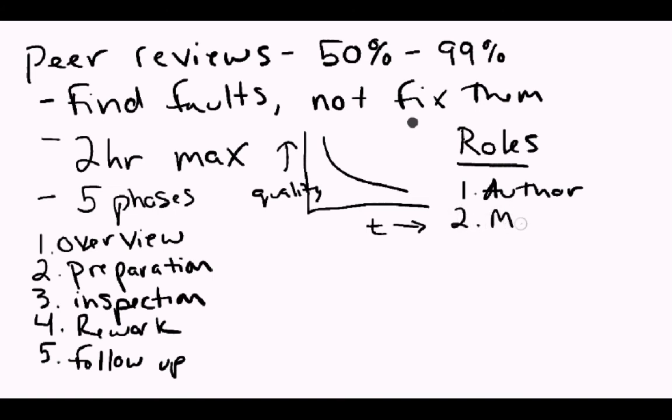There's another role in a code review called a moderator. Okay, and the moderator is usually a highly skilled lead developer, and they are the one who's responsible for ensuring that all the defects are actually fixed. So like I said, they manually look at the log of defects and they look at the updated code. The moderator also asks questions and really drives the discussion. If somebody says, I think this is a defect, the moderator might drive a discussion about why that person thinks we have a defect, and ultimately they are the ones who decide whether something is a defect or not.